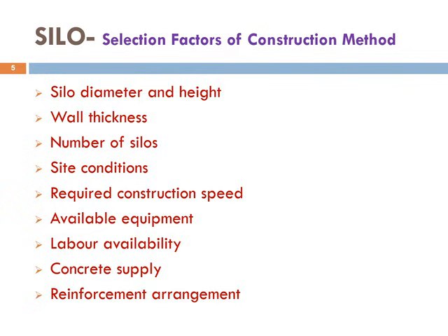We must also consider the availability of construction equipment and skilled laborers. Continuous and reliable concrete supply is especially important when using methods such as slip forming. Finally, the reinforcement arrangement must be considered.